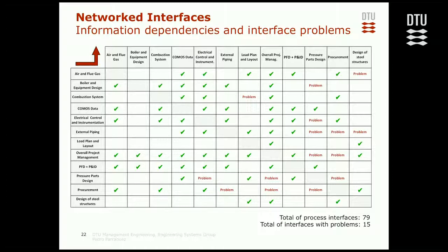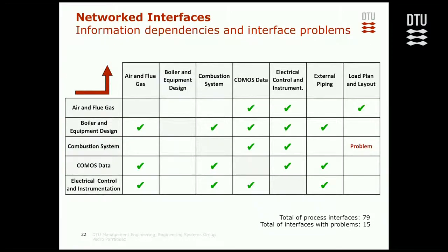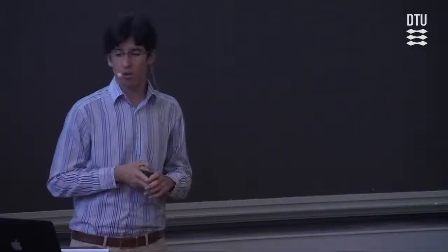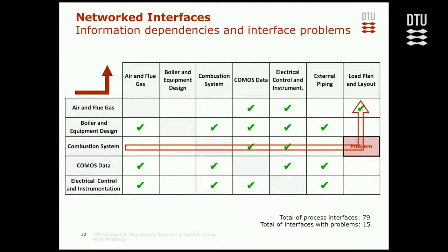To start the analysis of interfaces, we start with the technical part and map information dependencies in a matrix. In this matrix, the checks are information dependencies that were detected, and where it says 'problem' are areas that had some sort of issue during development. If we zoom in, we can read it as, for example: electrical control instrumentation has to provide information to COMOS data, or in other terms, COMOS data requires information from electrical control instrumentation. On the other side, a problem was identified — similarly, the combustion system needs to send information to load plane and layout, and in that process something happened that was reported as something that could be done better.